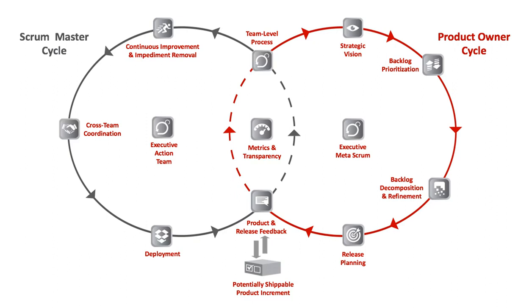EAT backlog and responsibilities: the EAT is accountable for the quality of Scrum within the organization — the entire SM organization reports into the EAT. The EAT's role is to create an organizational transformation backlog — a prioritized list of agile initiatives that need to be accomplished — and see that it is carried out. The EAT ensures that a product owner organization is created and funded and is represented on the EAT. The EAT's responsibilities include creating an agile operating system for the reference model as it scales, measuring and improving the quality of Scrum in the organization, building capability for business agility, creating a center for continuous learning for Scrum professionals, and supporting the exploration of new ways of working.